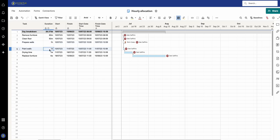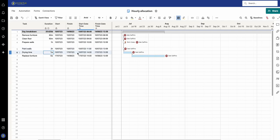Then paint walls, I'm going to make that two hours for example, and you can see that starts at 11 to 13:59 because it's assuming a pause for a lunch break in between no doubt.